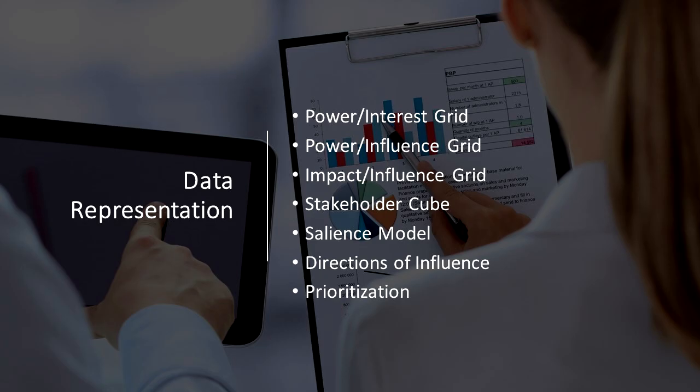We could classify stakeholders as upwards, senior management, for example, people in the C-suite, downwards, the team or the specialist contributing knowledge to the project, outwards, stakeholders that are outside of the project, such as suppliers, government, and public, as well as end users, and maybe even regulators.